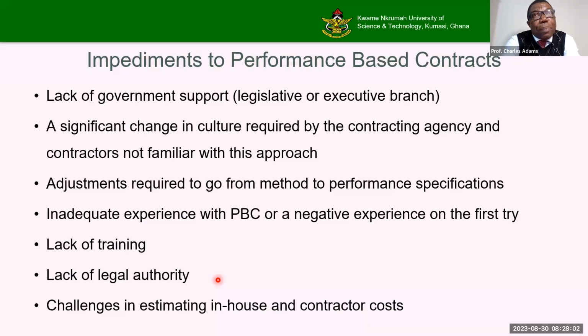We know how to make a BOQ and project the engineer's estimate. But when it comes to doing a life cycle cost analysis for a road project like this, most engineers have not been schooled in it. So then we don't know about it, then let's avoid it. And that seems to be the story.